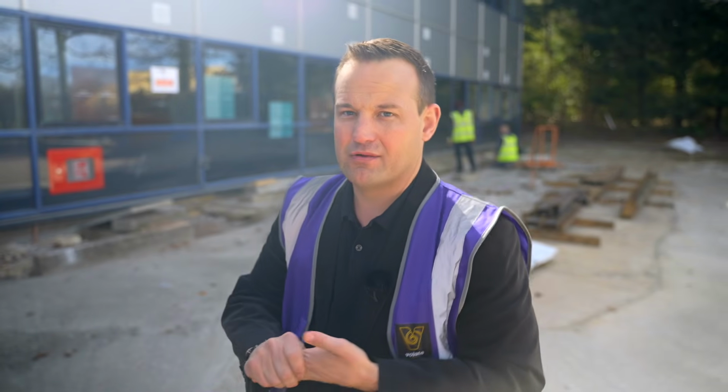You can also do some really quick and dirty numbers. Let's say we've got, I don't know, a 30,000 square foot office building like we've got here that we are in the middle of almost finished converting. We're weeks away from practical completion. 30,000 square foot, let's say an apartment is 600 square foot, what's 30,000 divided by 600? That's how many apartments you're going to get.